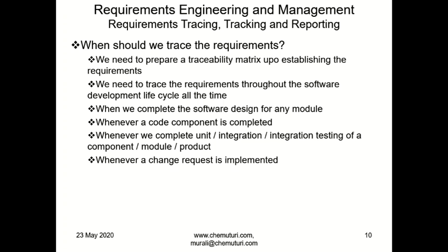When we complete the software design for any module, we need to update it. Whenever we code a component, yes, that has to be updated. Whenever we complete unit testing or integration testing of a component or modular product, we need to update the traceability matrix. Whenever a change request is implemented, we need to update the traceability matrix.